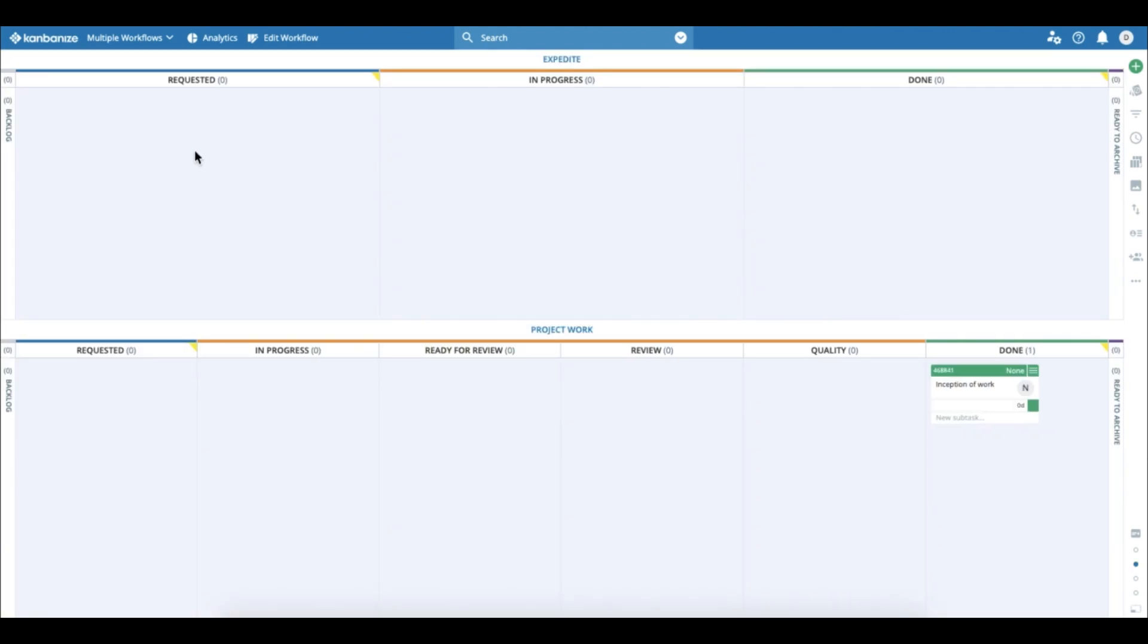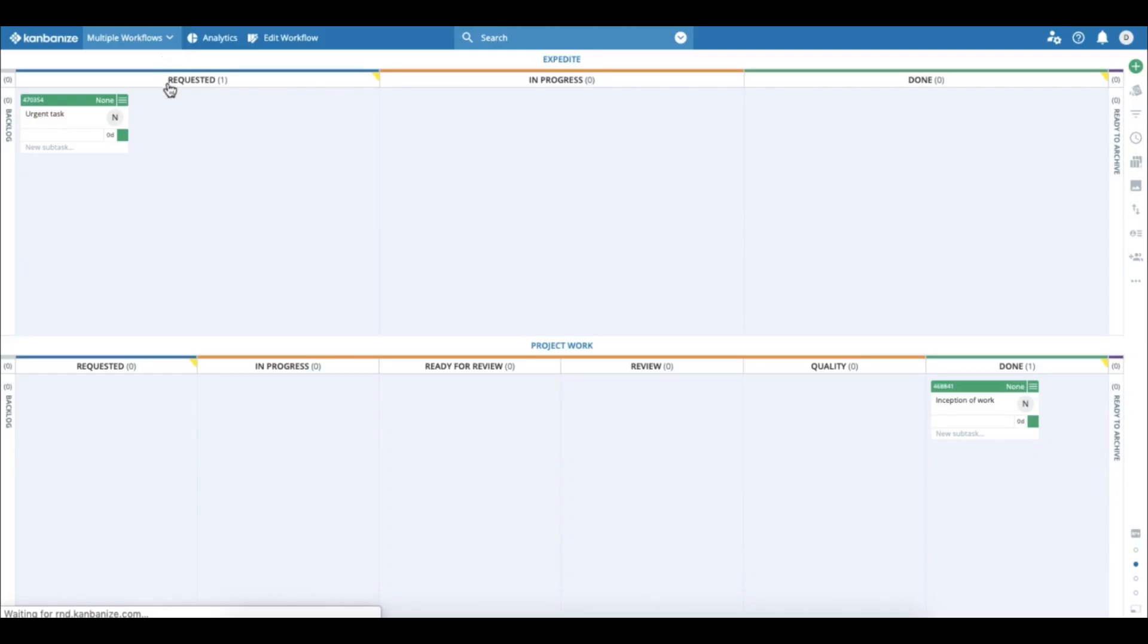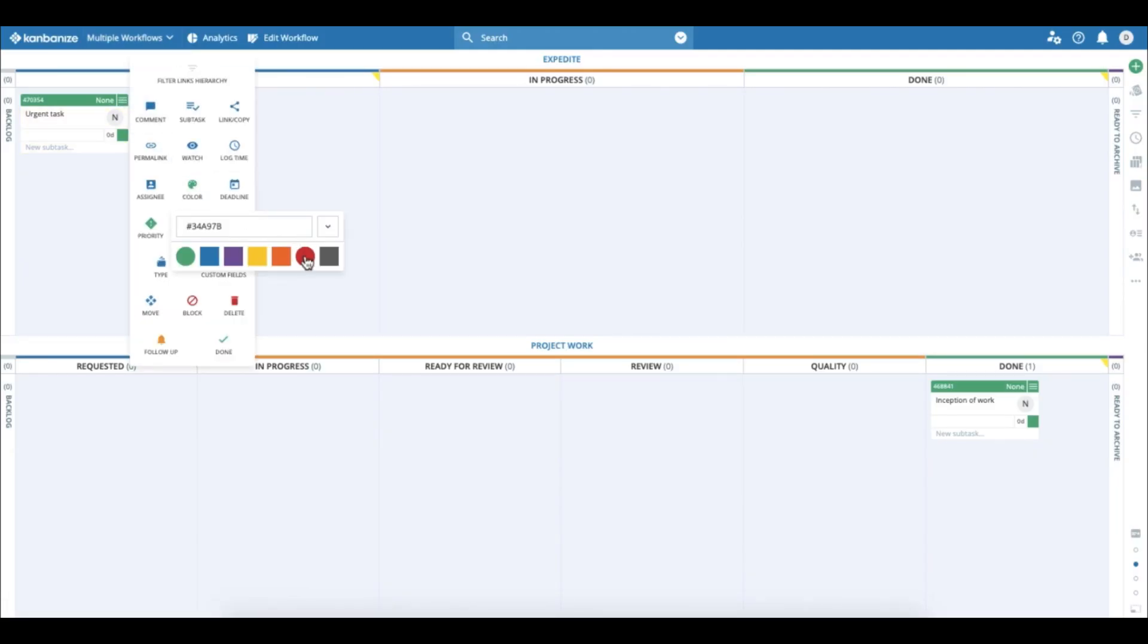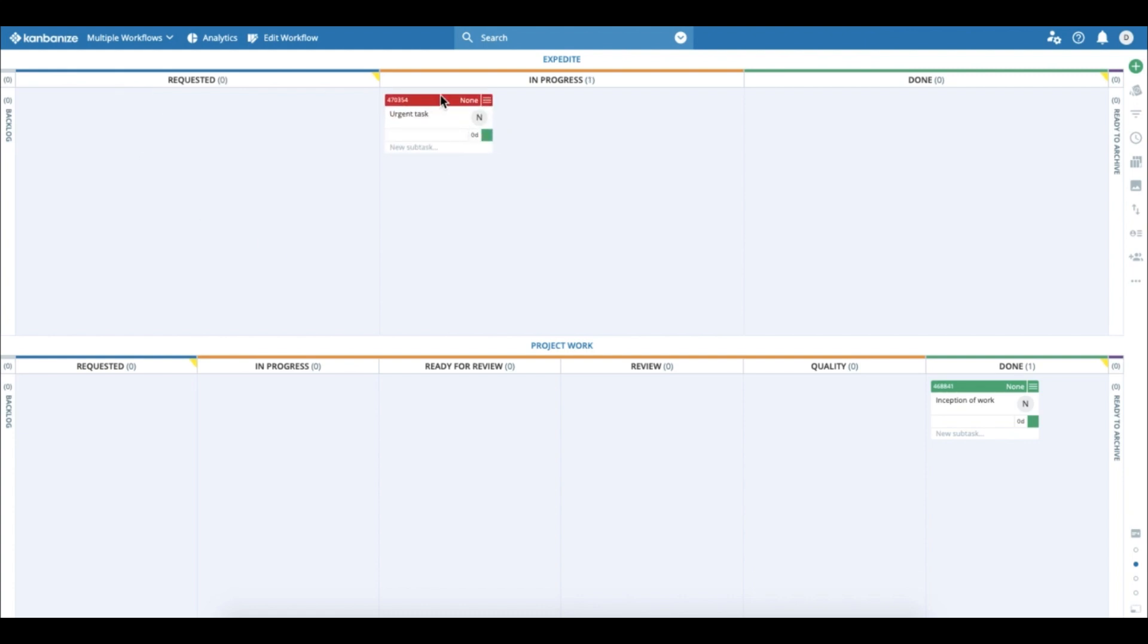And if an Expedite comes in, it's of course urgent and, you know, it's of course red. So this card doesn't need to go through all the stages from the bottom workflow. It just goes to in progress and then goes to done.